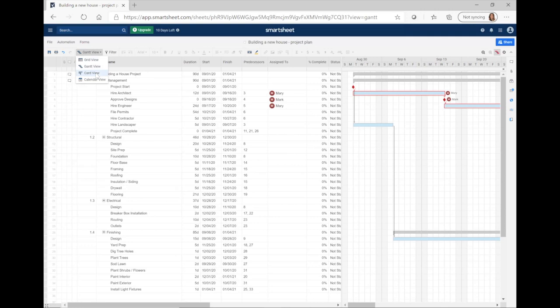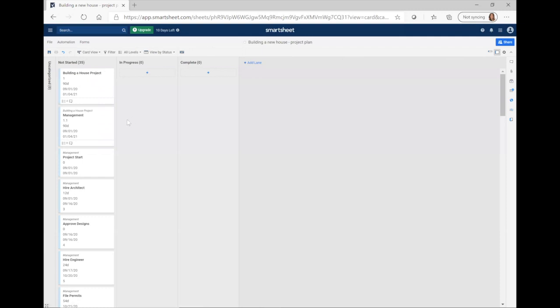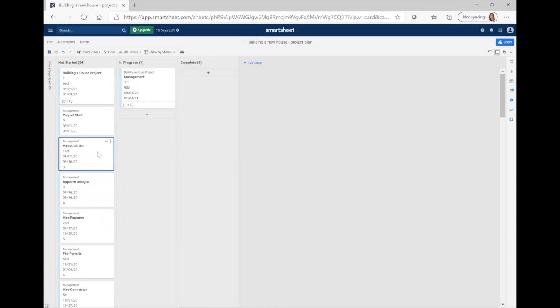Another view is card view. This is a great way to visually see where all the work in your project stands once you move into execution mode. Currently all tasks fall in the 'not started' column, but once execution begins, you'll be able to see tasks in progress and completed. You can also drag these cards to mark them as in progress or complete, and it makes the actual updates in the grid or Gantt chart.